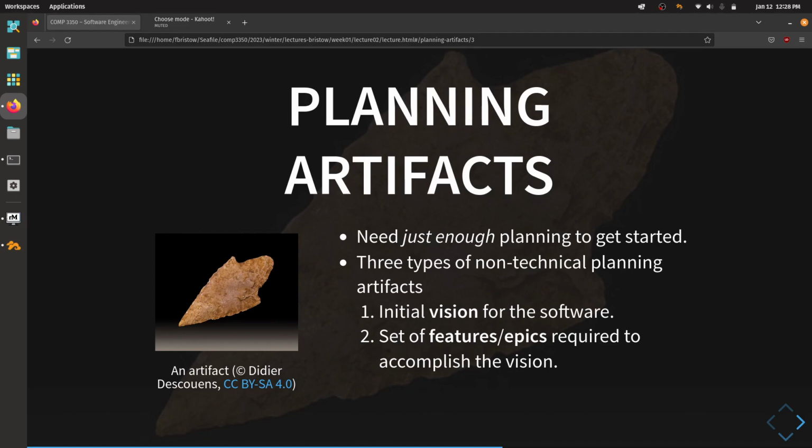The features or epics that you're building are too big to actually do. They're too big for you to sit down and code. So the next part is to take that epic and break it down into smaller, more actionable user stories. This kind of person wants to be able to do this very specific thing for this reason. We're basically starting with a major problem and breaking it down into smaller pieces, and breaking those down into smaller pieces, iteratively.